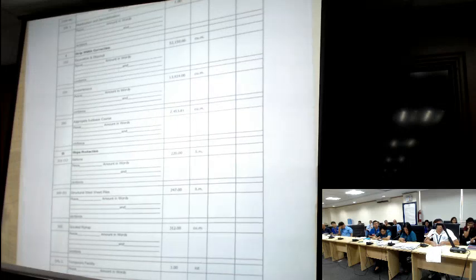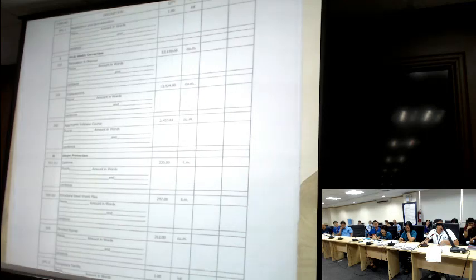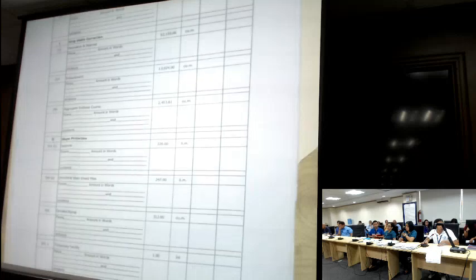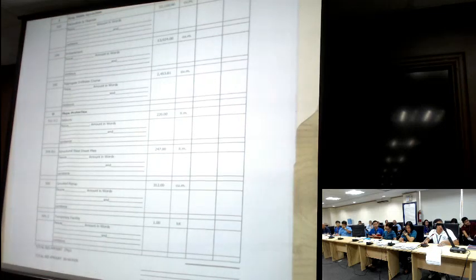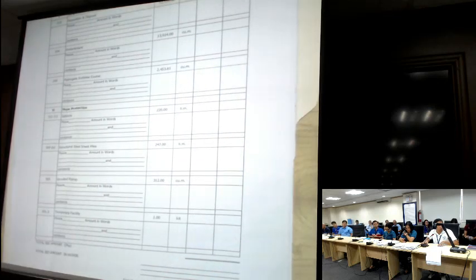Scope of works. We have one, district grade correction, covering a volume of 52,159.66 for excavation and disposal, and for embankment, we have 13,924 cubic meters, and for aggregate sub-base course, 2,453.81 cubic meters. So this is the reason why kailangan po natin SLCCs for embankment works and unpaved roads. And for item 2, slope protection, we have the gabions, 220 linear meters, structural steel sheet piles, 247 linear meters, and grouted riprap, 312 cubic meters. And SPL1 and SPL2: SPL1 mobilization and demobilization, SPL2 tempa seal.